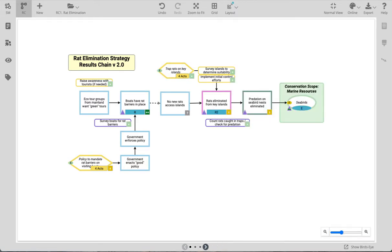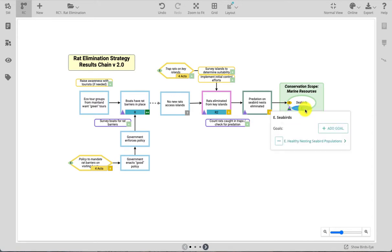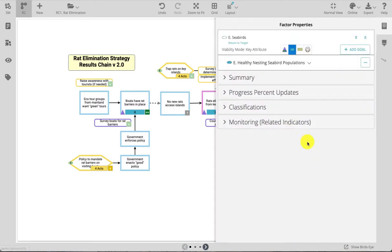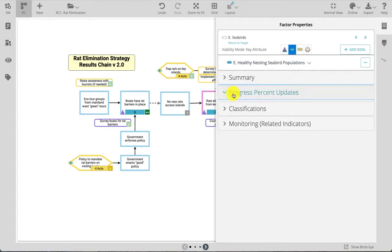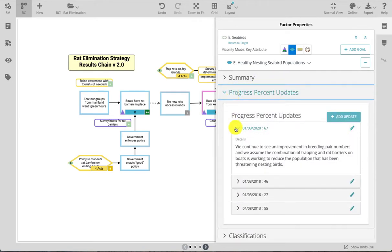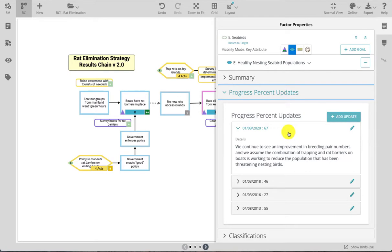To provide a progress report on a goal or objective, or to update an indicator measurement, you must first open the factor properties panel. For example, click on a goal in your project and navigate to the factor properties for that goal. Under percent progress updates you can see all of the current as well as any past reports on progress toward that goal. If you have editor permissions you can edit or add new progress updates.